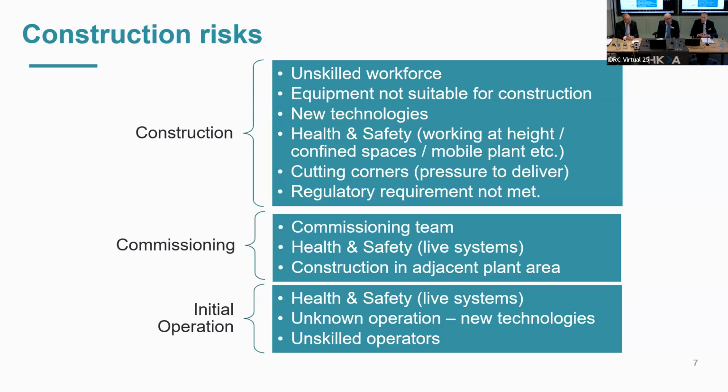I've come across facilities that use exotic metals, something like Inconel, where they've used stainless steel welders and all the welds have failed. Health and safety on sites tends to be paramount, but you do find corners are cut due to pressures to deliver the site, and often regulatory requirements are not met.